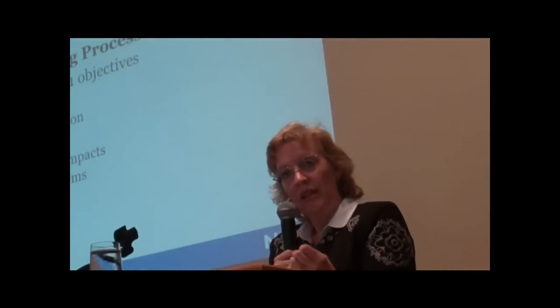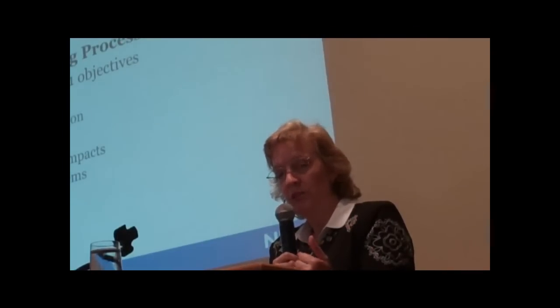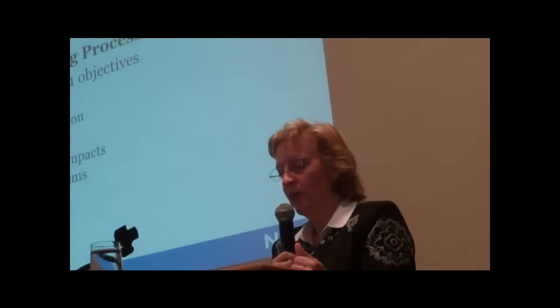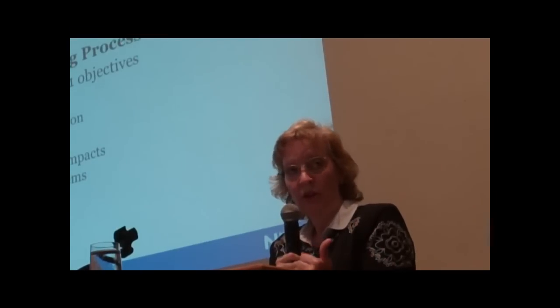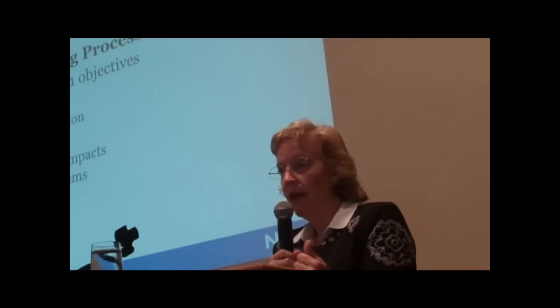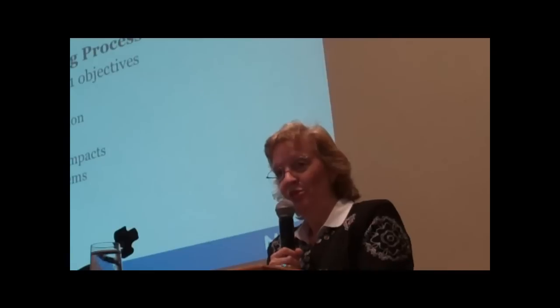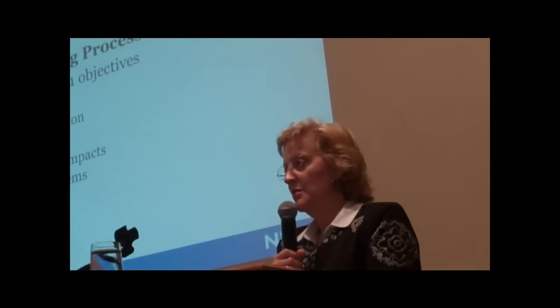We're going to utilize our Tier 1 objectives and start delving into even more depth and detail of our information. We're going to do construction cost estimates to implement it, as well as operational cost estimates. We're going to do an environmental scan because we are trying to be eligible for federal transportation funds through FTA. There are certain NEPA requirements we'll have to do, but all these things we're going to be looking at what's the major differences.